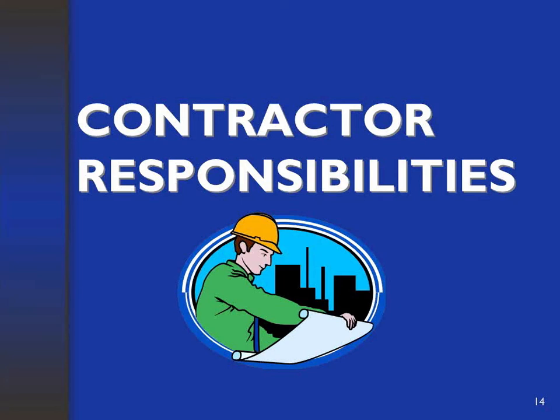There's no hard and fast rule. There used to be a 10% rule, 10% of all the trades, all the different subs. But that's a guidepost. It's not hard and fast. I would say if you can cover a good majority of the various classes throughout the project, and you might start with one sub, I'm just going to use electrical at the beginning, and you